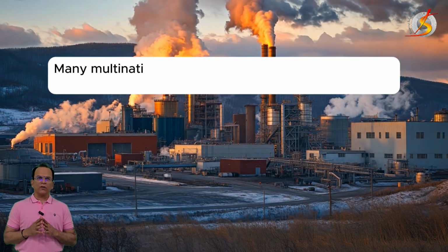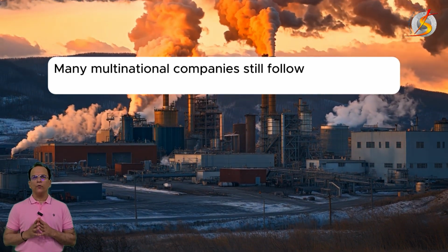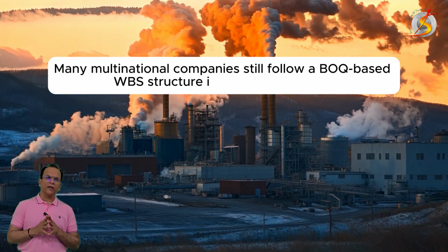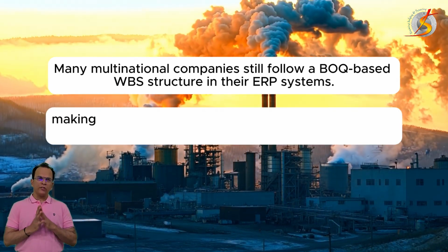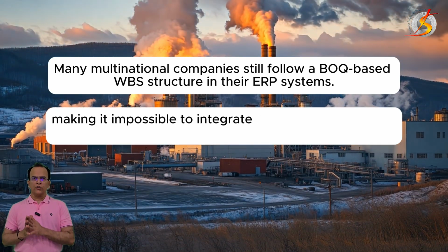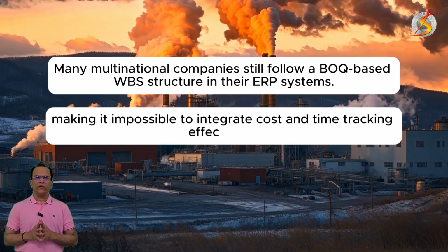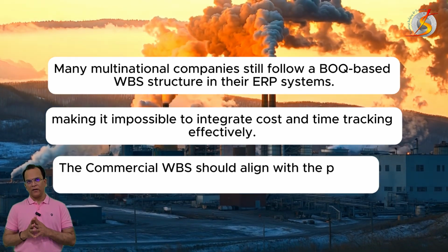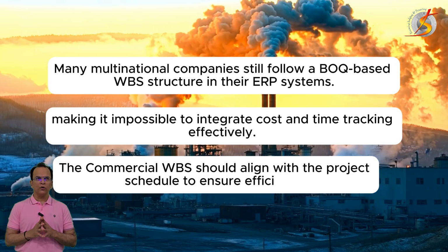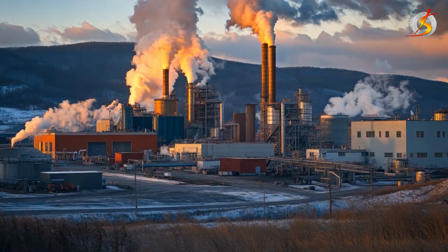Even many multinational companies still follow the BOQ-based WBS structure in their ERP system, which makes it impossible to integrate cost and time tracking effectively. So the process-based WBS can be aligned with the project schedule to ensure efficiency.